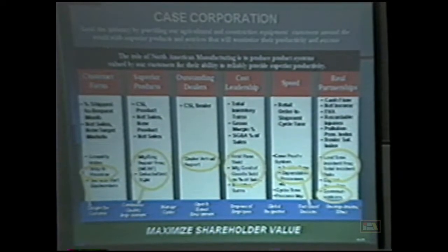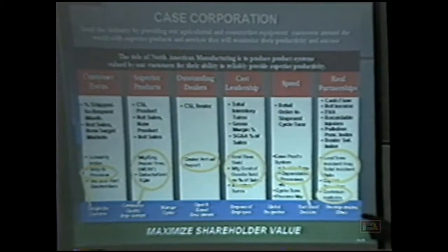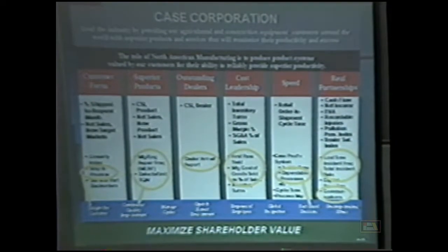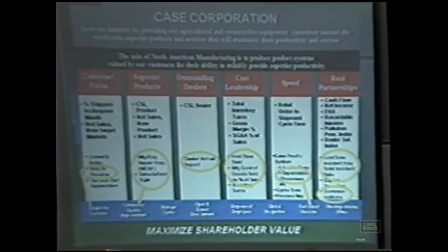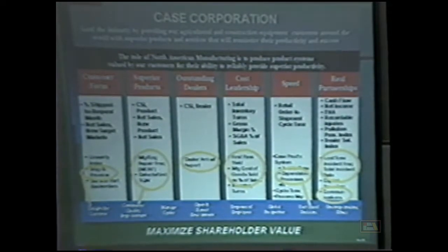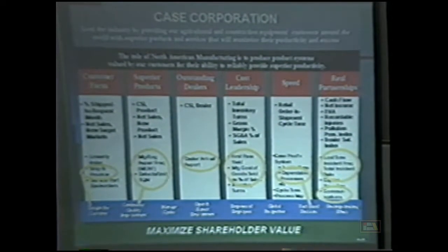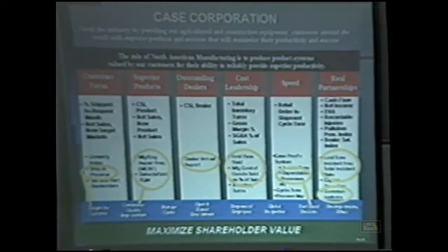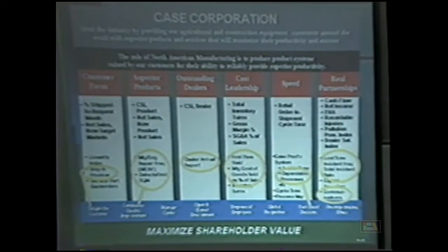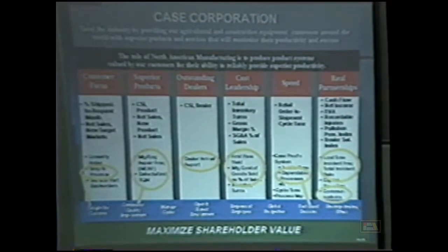Looking at costs. SuperCape software was purchased about 1.5 years ago, and there was no charge to the plants. We already own about 80 seats of it. Database software to run it on the local PC, assuming about, was that 10? Maybe 10 users or so, is $2,500. You also need a server if you don't already have one with space on it. That's not a small item. It's about 50 grand.